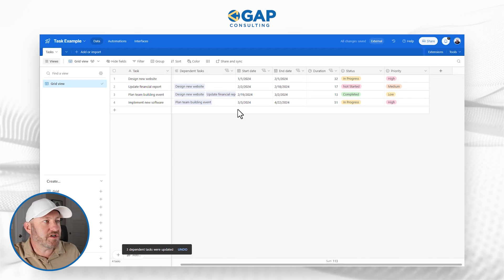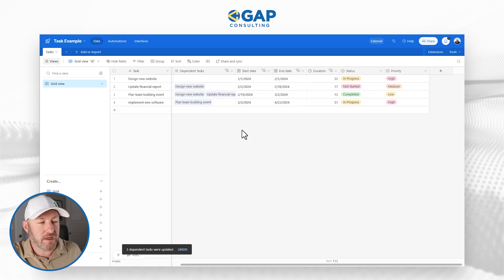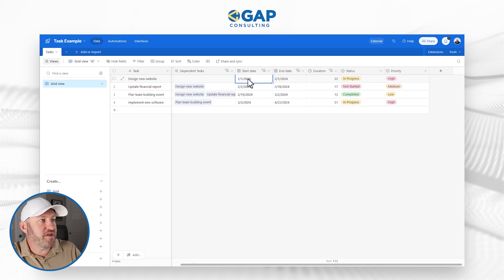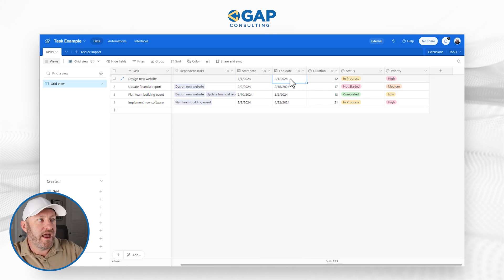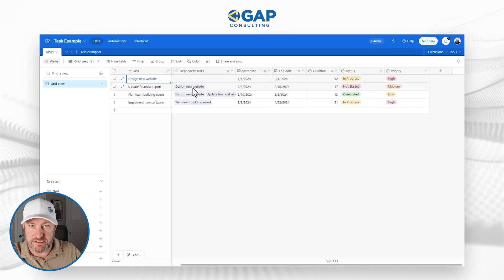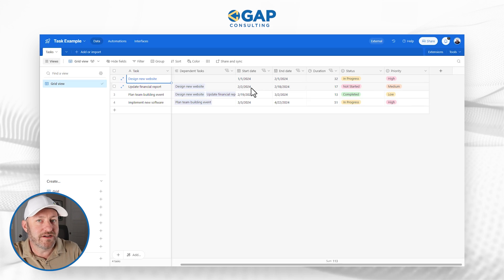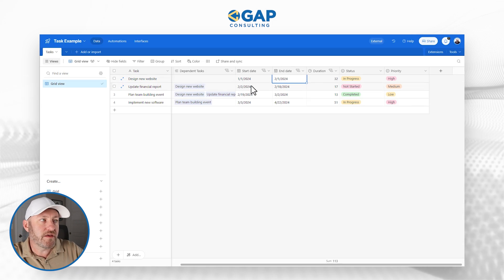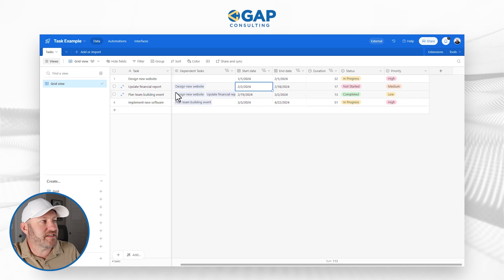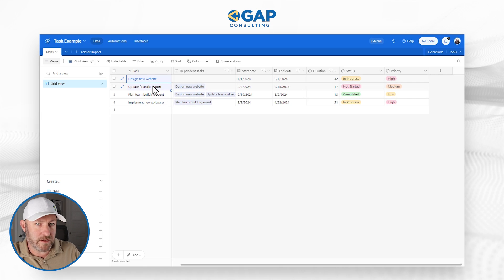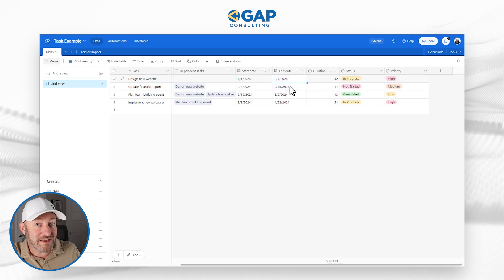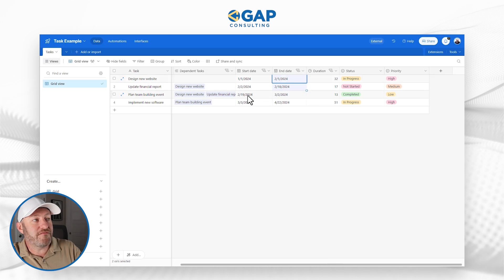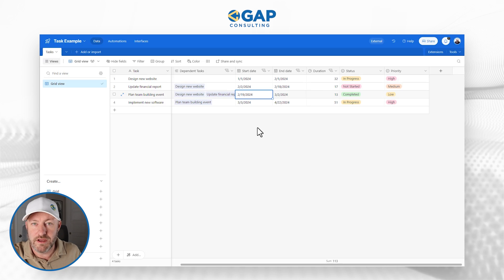And what this is going to do is allow our entire table of data to recalculate. So what's happening is, it's saying, well, look, this particular task right here ends on Feb one. And this task relies on this task, see the dependency. So we know that this task cannot start until after this one is done. So if this ends on Feb one, this has to start on Feb two. And then this task, task three, plan team building event relies on these first two tasks to be complete. So whichever of these two dates is greater, that's going to be the last date that we can start. So here it is on Feb 19. This has recalculated to start, and so on and so forth.